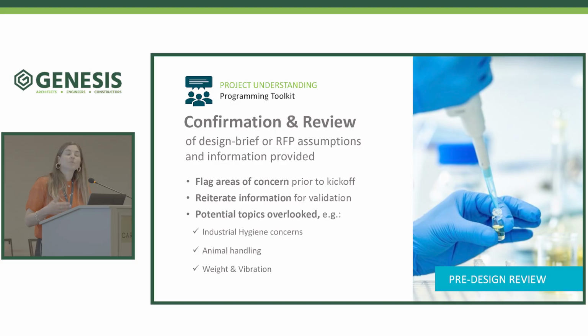So this is about being prepared coming into a project kickoff, and as a designer and as an architect, doing the homework and really digging into the design brief or an RFP or whatever baseline documentation and project understanding you've been given. Important not to take this at face value, but treat it as a hypothesis, read it critically, and look for gaps and flag assumptions to reconfirm those. This is where background and historical knowledge of clients can be very helpful as well, understanding client-specific standards to understand how those might need to apply to specific programs.